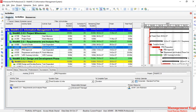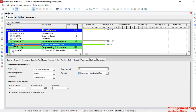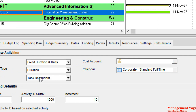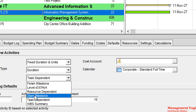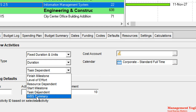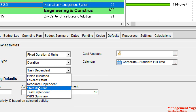To view the activity types, first go to the Project tab in the window, which opens up the Projects window. In the bottom part, go to the Defaults section. Under Defaults, we have multiple activity types: task dependent, resource dependent, finish milestone, start milestone, level of effort, and WBS summary.